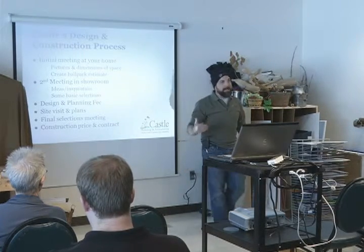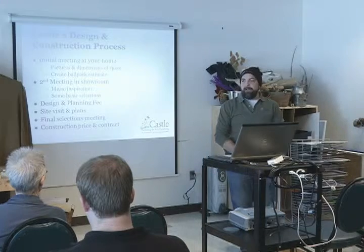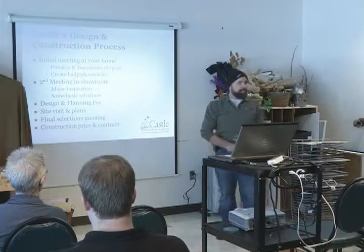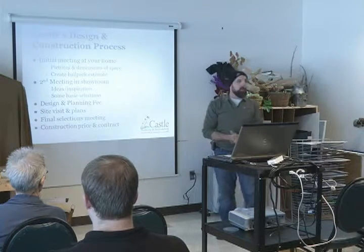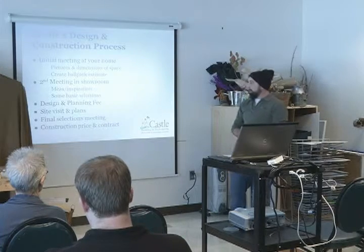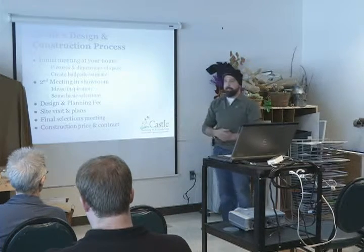So that hopefully with Castle, when you get to a contract, we'll have a guaranteed completion timeline because we've worked hard to figure out all the details. So we'll say 30 working days, we're out of here, otherwise we owe you $40 a day. We also really want to limit any change orders once we reach a contract.